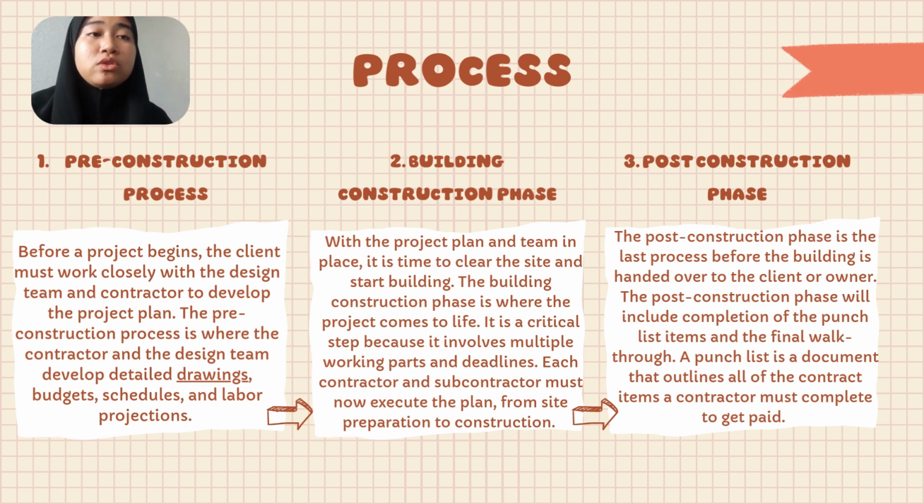Number 3, post-construction phase. The post-construction phase is the last process before the building is handed over to the client or owner. The post-construction phase will include completion of the punch list items and the final walkthrough. A punch list is a document that outlines all of the contract items a contractor must complete to get paid.